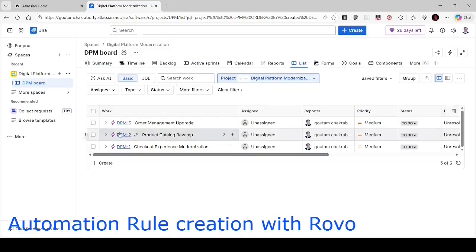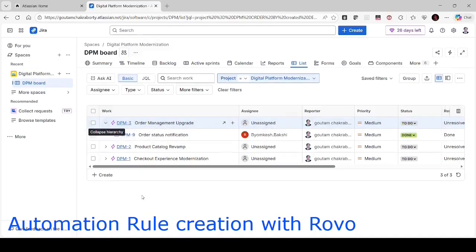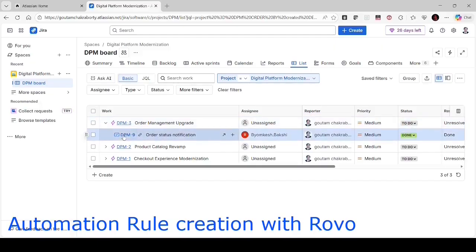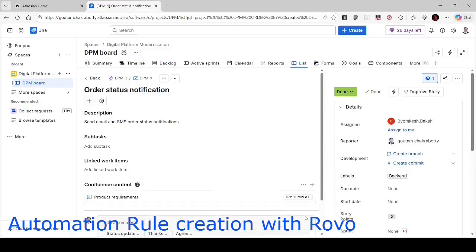Now, in this project, I have designed the stories in such a way that whenever a user story will be created, we shall associate one label which will indicate the type of work. It should be either front end or back end or QA, so that whenever the user story from the backlog will move to a sprint, we shall be able to identify to whom from the assignee list I can assign that user story.